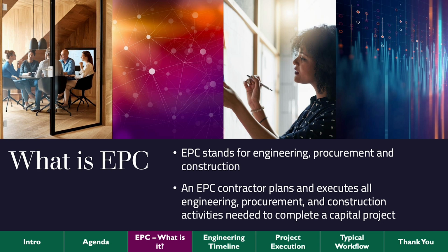And failure to comply with any of those requirements will usually result in a contractor incurring monetary liability. And it's a very fair game, because at the end of the day, that EPC contractor will get what they are asking for. But if you are not delivering, you are supposed to be penalized. 100%. So this is a very fair game in that sense.